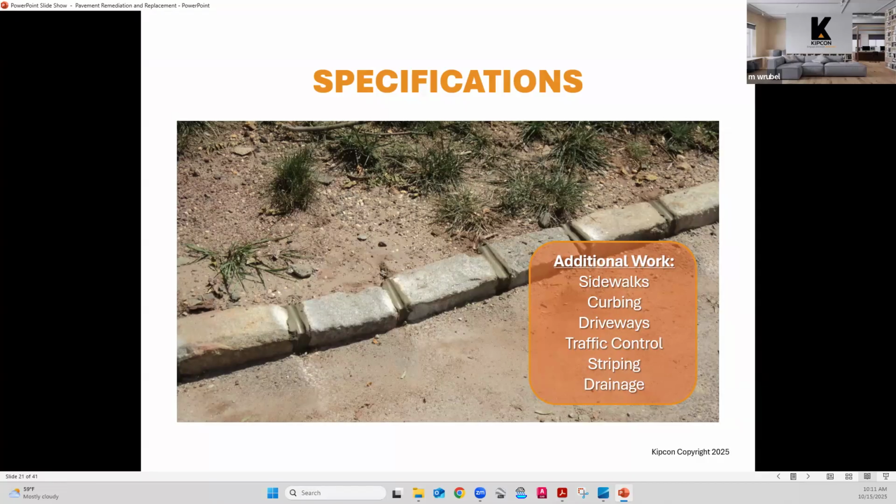You might want to just, in the first couple of years or year, do some light localized repairs to that entrance roadway just to keep it functional. But you want to start in the back and you want to move forward and then maybe end up in your last phase with that entry roadway. Even though it's in the worst condition, that's your path in and out of the community. So you want to protect that as you're moving through your project.